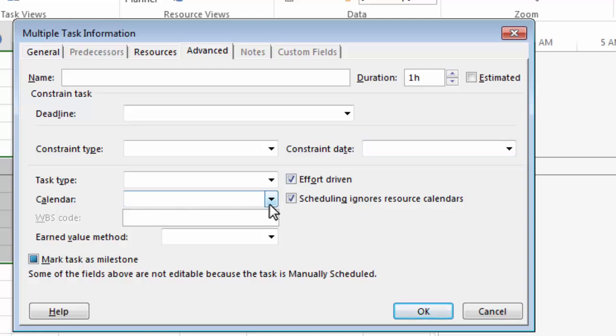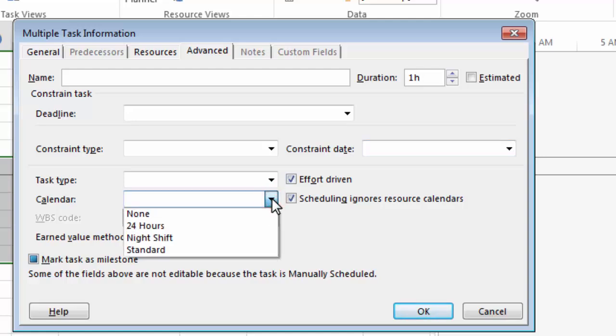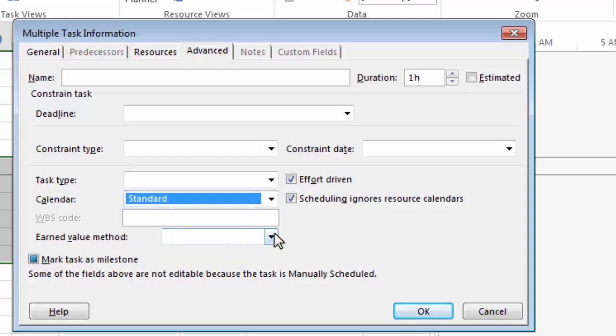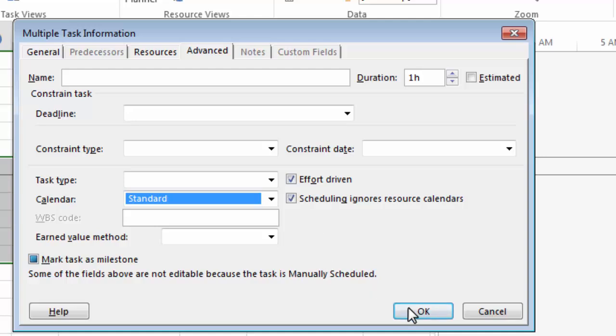And what I need to do, I need to assign a calendar to this task that is a regular business calendar or your project calendar. I'm going to select standard as the example. Remember, the standard calendar has working time 8 to 12, 1 to 5, and Saturdays and Sundays are off. But you can assign your own project calendar to this task. Now, this is important because I don't want this task, the setup, to happen outside of business hours. And now I can click OK.